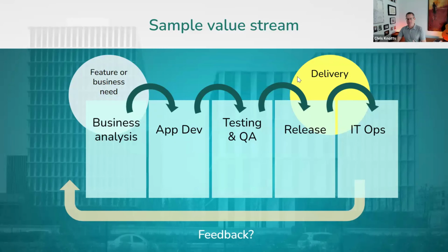If we don't have any chance of realizing value until after delivery, then if all of this stuff in the front end took 10 months or a year and a half, man, that's a long time not to be getting value. So if we can understand ways to shrink this cycle time, smaller and smaller, then we have an opportunity to produce value faster.